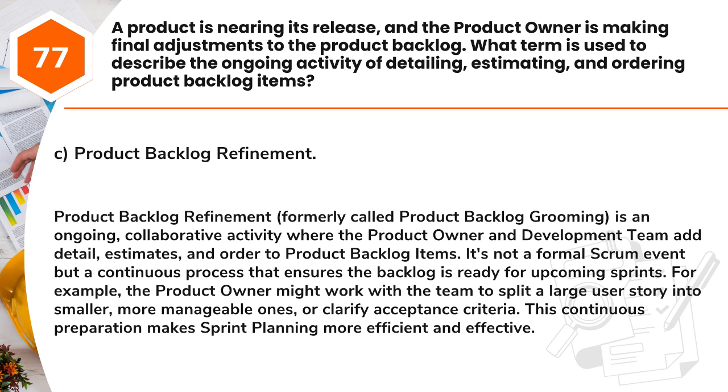Answer: C. Product backlog refinement. Product backlog refinement, formerly called product backlog grooming, is an ongoing, collaborative activity where the product owner and development team add detail, estimates, and order to product backlog items.